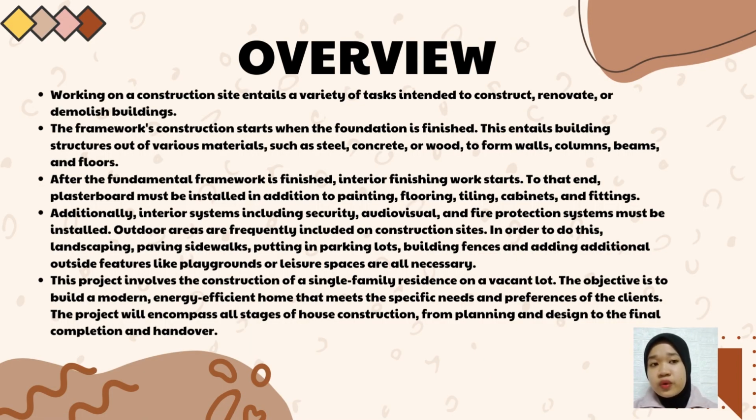For the overview, working on a construction site entails a variety of tasks intended to construct, renovate, and demolish buildings. The framework construction starts when the foundation is finished. These entail building structures out of various materials such as steel, concrete, or wood to form walls, columns, beams, and floors. After the fundamental framework is finished, interior finishing work starts. To that end, plasterboard must be installed in addition to painting, flooring, tiling, cabinets, and fittings. Additional interior systems including security, audiovisual, and fire protection systems must be installed.